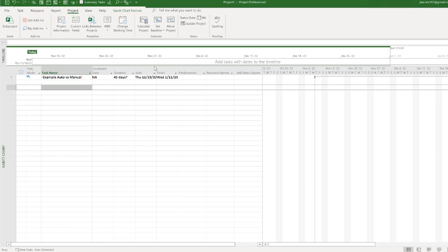But with that said, we're just going to proceed on with the start date, and then we have another function called project finish date. This is where I can pick any finish date in the future that I would like. It just depends, or it can be a client requirement. It just depends, again, on your contract. And you can change it to where you base it off the finish date and basically do what is called backwards planning. Backwards planning means we go back in time from the finish date that we're expecting to see when we should or need to start in order to meet said finish date.